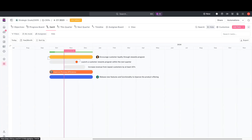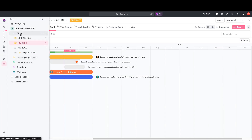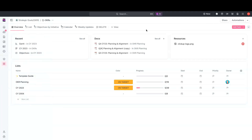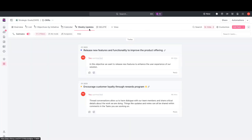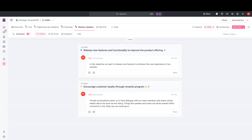The last thing I want to talk about is a weekly updates activity view. I'm going to navigate to the OKRs folder and take a look at an activity view that's set up to view comments. When your team is providing weekly updates, the best practice is for them to use task comments. In that way, you can capture this detail in an activity view at the folder level, showing you details about activities happening across every list within that folder across all those tasks. With activity view, you can filter for comments, so you'll be able to quickly and easily find the latest updates against your objectives and key targets.